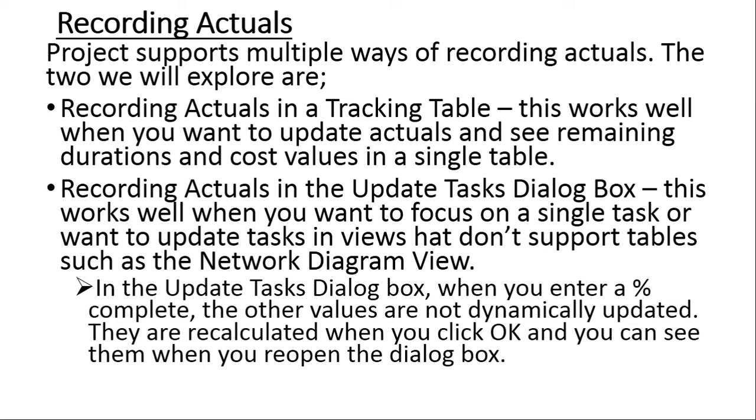We can also record the actual values in the Update Tasks dialog box. So there's a dialog box where you can go to record the progress on a single task. It does not allow you to update more than one. It's simply updating a single task.